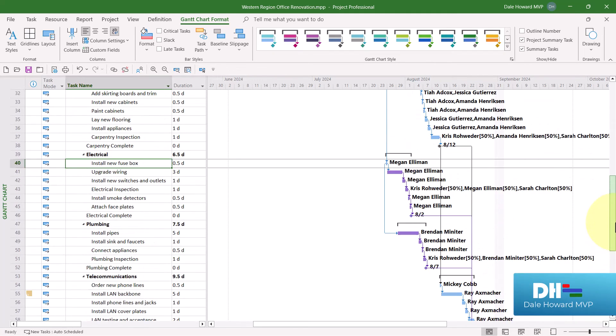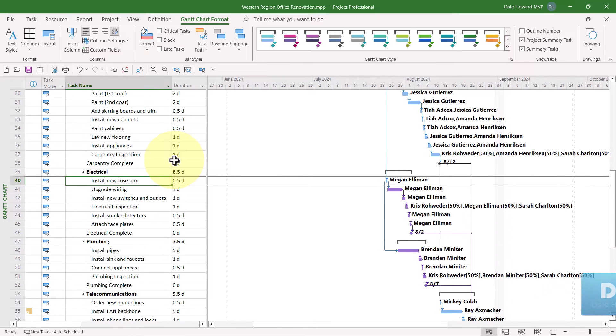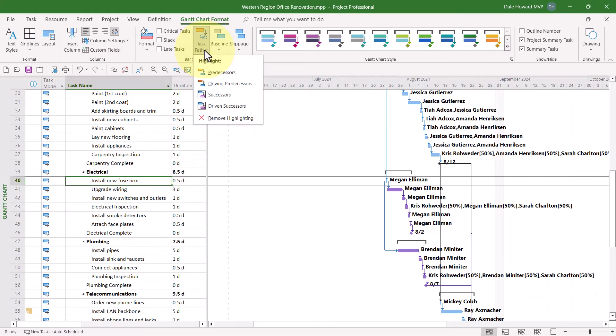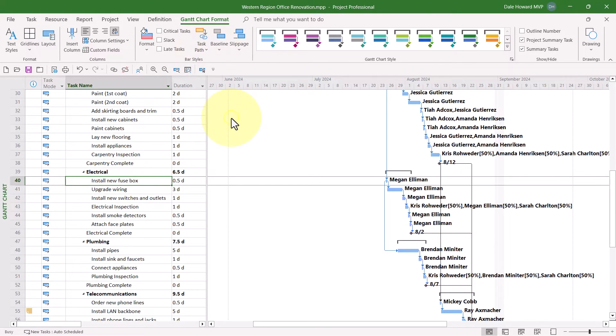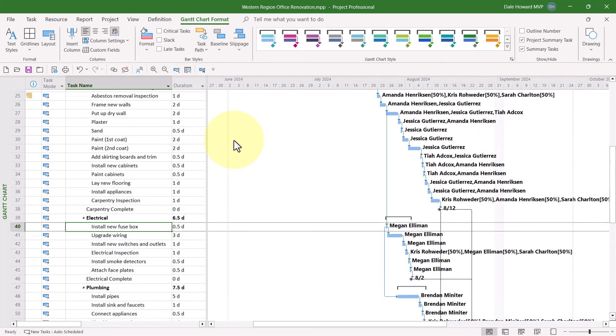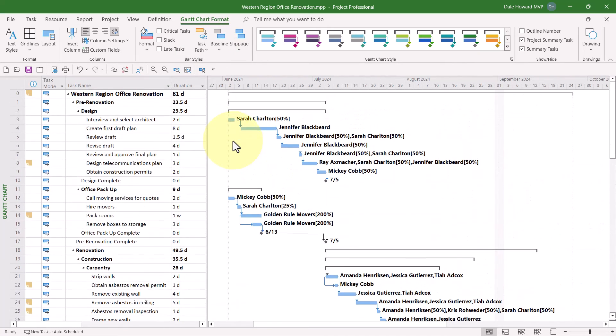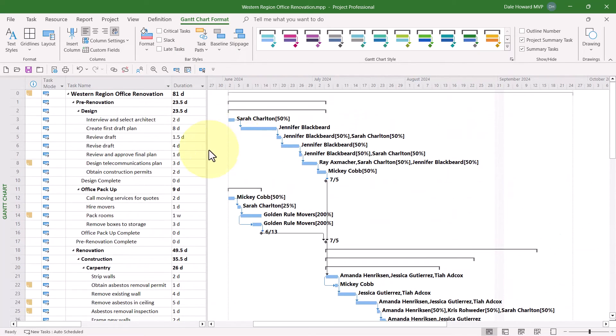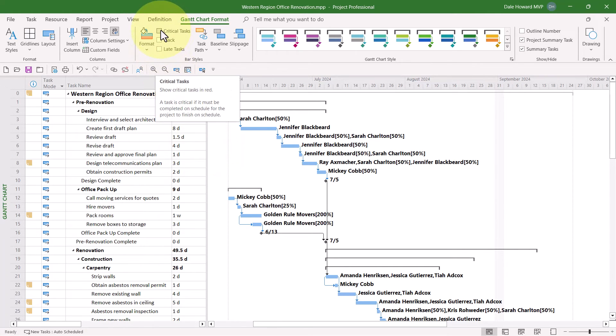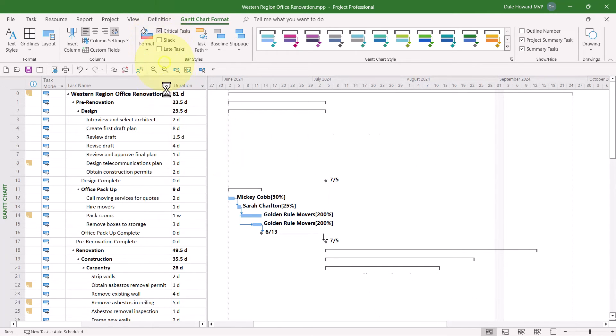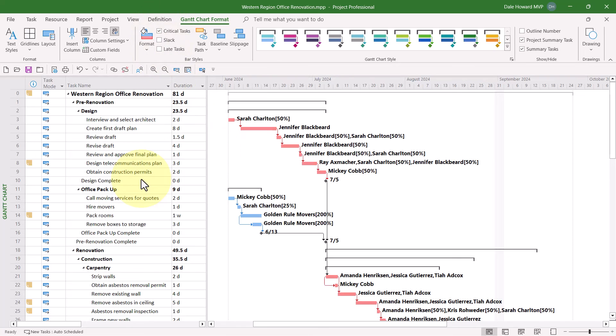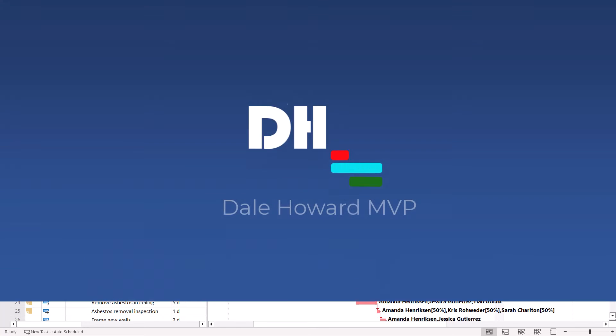When you finish with analyzing Predecessors and or Successors, click the Task Path Pick List button, choose the Remove Highlighting option, and then if you did have the critical path displayed in your Gantt chart screen, be sure and select the Critical Tasks checkbox as well.